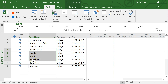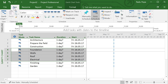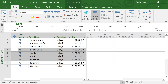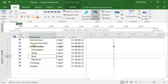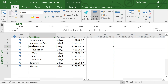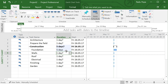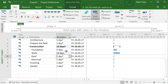You'll notice that tasks like foundation, walls, roof, and electrical are related to construction. I want to put them under a 'Construction' parent task. I'll select those tasks and use the indent button — there's also a hotkey if you're interested. After indenting, 'Construction' is now bold, meaning it's an outline task that summarizes everything underneath it.